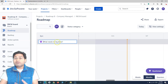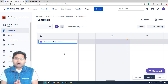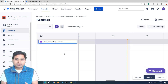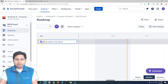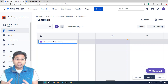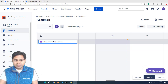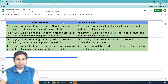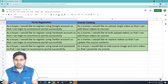There's nothing special about creating the roadmap — it's already there, we just have to start populating our work items for the project. I'll take the example of developing a website with certain work items assigned to a team. They'll start creating epics. In Jira, an epic is the higher-level or big piece of work that needs to be broken down into smaller pieces. For example, 'Portal Registration' — on a courses website, I want registration functionality available for users.